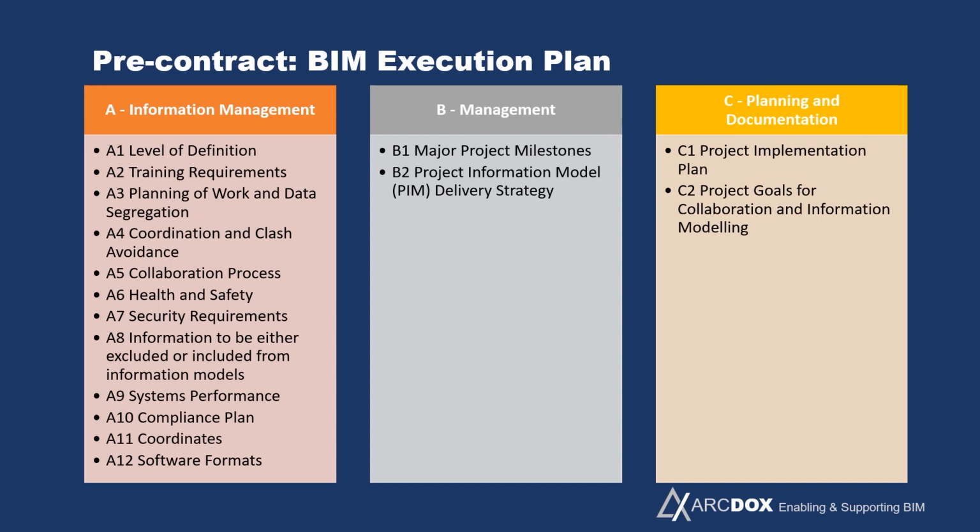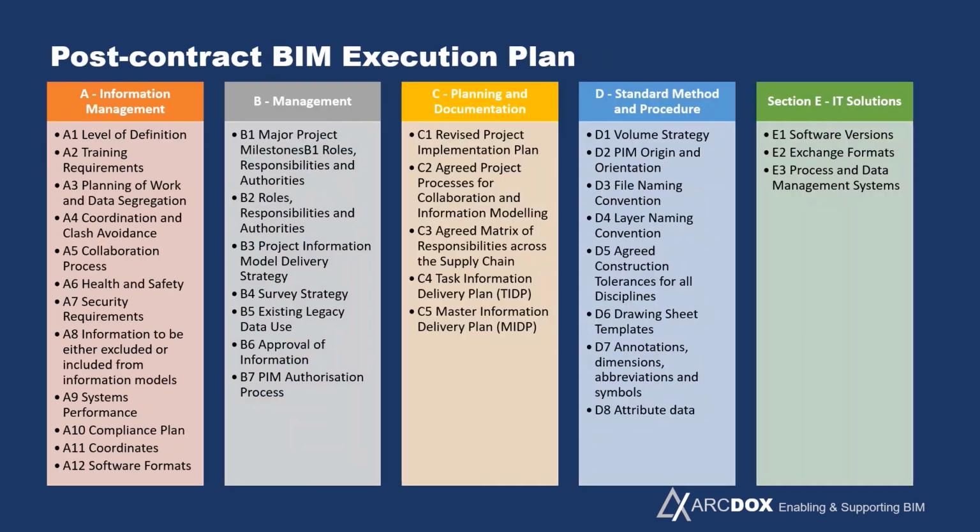And similarly, the BIM execution plan, the pre-contract version, if you look at the headings here, they're almost exactly the same as the EIR. In other words, the supply side, the designers and the contractors, are responding to the relevant sections of the EIR, and that's why they have a similar structure. Once they get appointed, obviously then they'll flesh out that BIM execution plan in more detail to cover their standards, methods and procedures, and get specific about various IT solutions they're going to be using, and start developing their information delivery plans, etc.